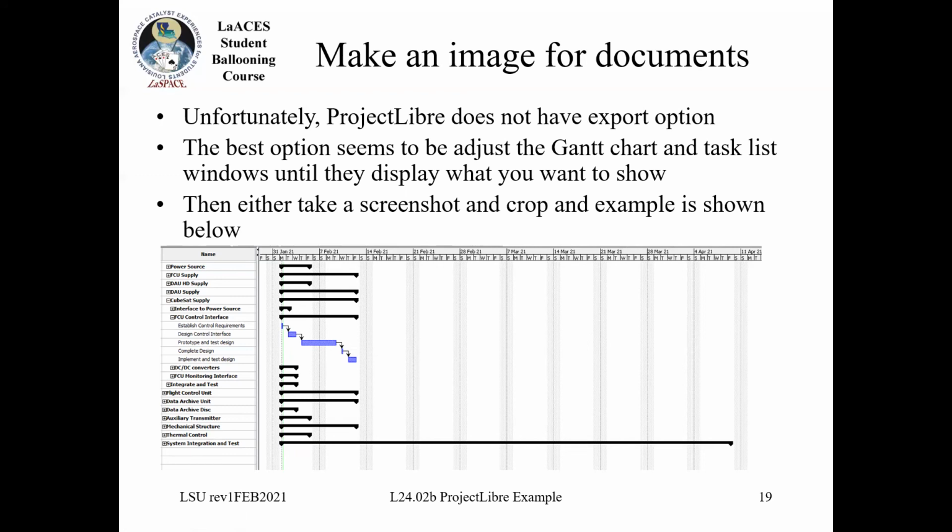But this is just sort of the basics of how you create a schedule. The idea being that if you put in all of the predecessors and the times for the lowest level tasks, you'll generate a timeline of all of your individual tasks that have to be completed and give you an idea of how much time you need. And that is it for the example of the project software.